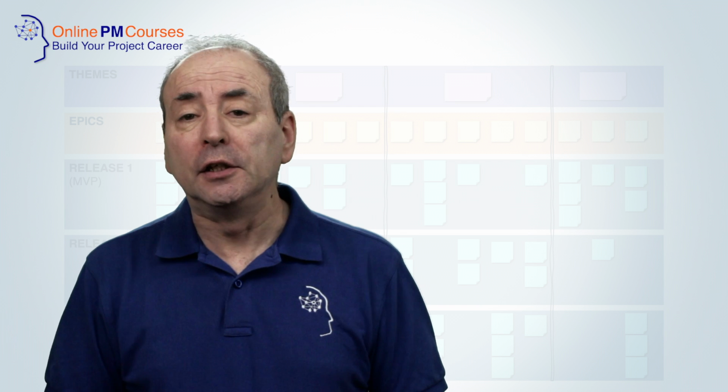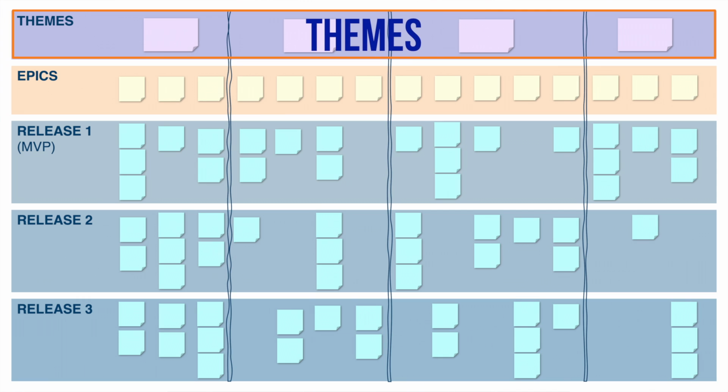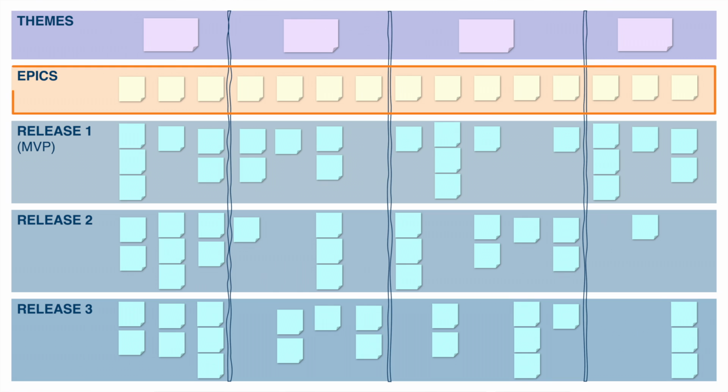User story maps are usually presented like this. At the top, the themes or user activities represent the highest level of the things that users will need to do. Below these are the key steps in the process flow through the product or the service, arranged in a horizontal row. These are the major tasks that the user will need to perform, arranged in the sequence in which they'll need to perform them.